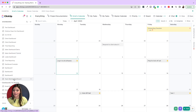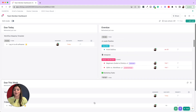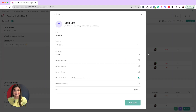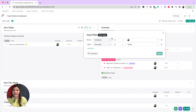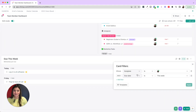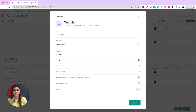Let's take a look at the team member dashboard. This dashboard has multiple list widgets filtering out what's due today, what's overdue, and what's upcoming this week. To create this, add a card that is a task list, name it Due Today, Overdue, and Due This Week, select all locations, include subtasks, and then do a couple of filters for each widget. Those filters are: assignee is that specific person; for Due Today, due date is today; for Overdue, due date is overdue; and for Due This Week, due date is this week. The Due This Week widget is grouped by due date instead of status, so they can see Monday, Tuesday, Wednesday, etc.